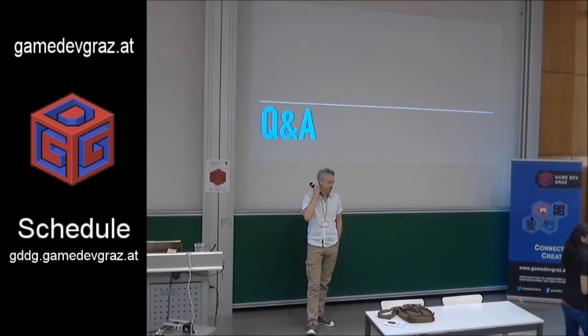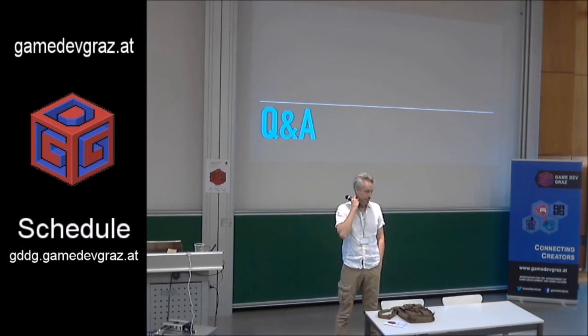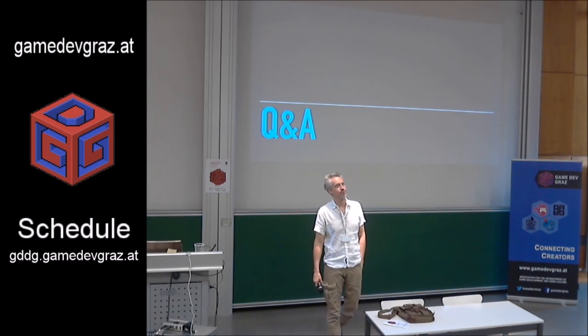According to the game's crunch time, what we realized was that we put too much time in the beginning into some task and made something really, really beautiful, which not only took away time from later tasks, but also set a higher standard that we had to keep for all other tasks, which actually exploded tasks which should have been simpler. So that actually grows exponentially with the time you spend on it. Did you find any way to smooth that, to lower the quality slowly over time on the rest of the project? This is always a discussion for us: we build a track and then, oh my god, now all the tracks have to look like that. All our levels have to look like that because we made this too detailed and we can't change this anymore.